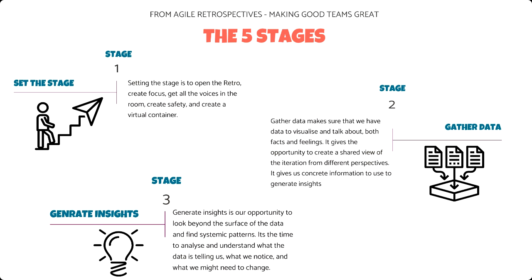All right, stage 1 is about opening the retrospective. It's called Set the Stage. In stage 1, we want to make sure that we are making space for all the voices in the room. So creating a way for people to check in, or to be heard, or share a thought, something short and sweet, connecting either to the retro topic or connecting to each other, or some way to get into the space. It's also our opportunity to create safety.